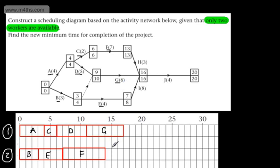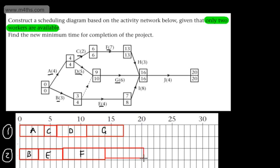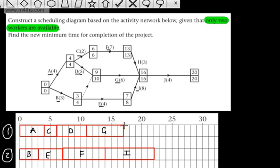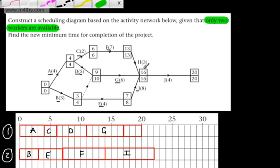F has now been completed, so Worker 2 is ready for the next task — I give them activity I. Activity I has a time period of 8, and as you can see, adding this on takes us past the original critical time for the project. So we've already exceeded that time. Meanwhile, Worker 1 can now be allocated activity H. H depends on the completion of F only, so I allocate H to Worker 1 — that's 3 time periods.